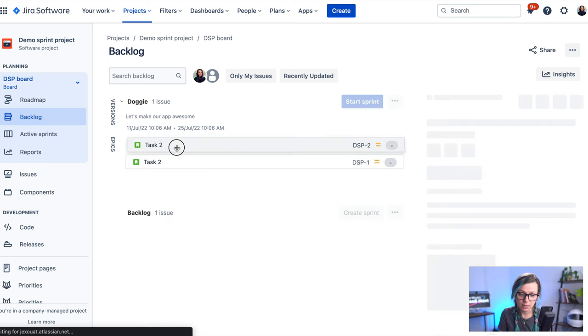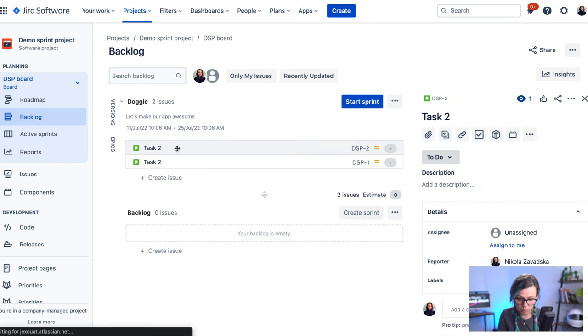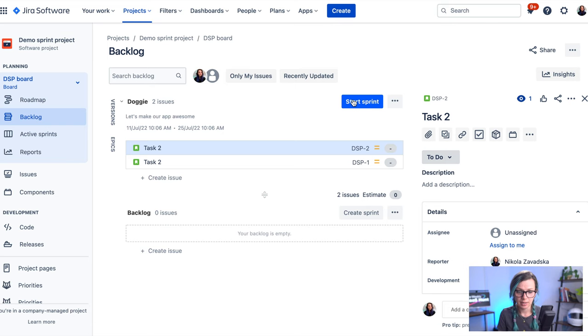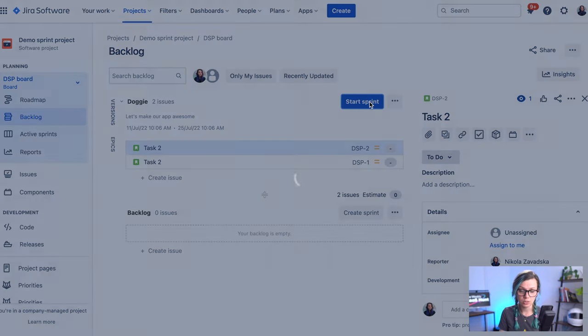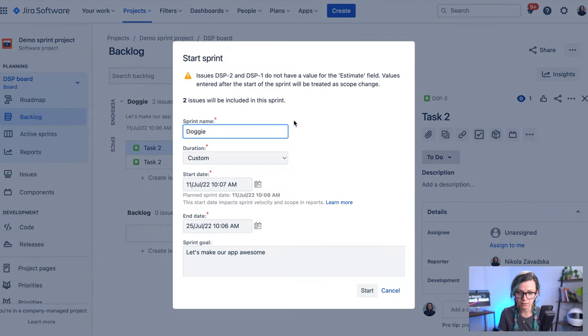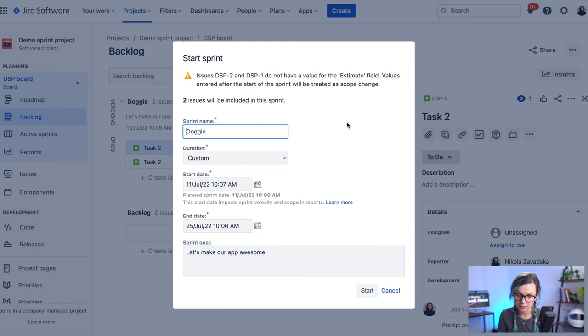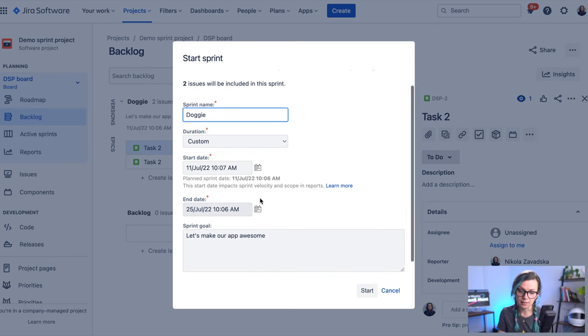So you need to assign the issues to your sprint. So I just drag and drop them there. And now when you have issues in your sprint, you still won't be able to see anything on your Kanban because you didn't start the sprint yet.